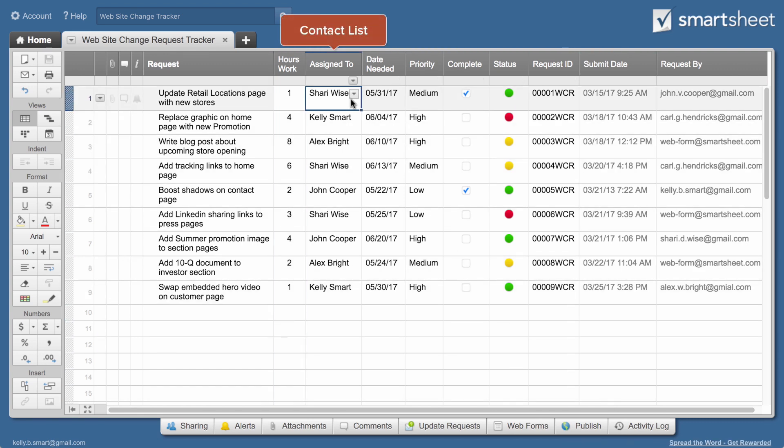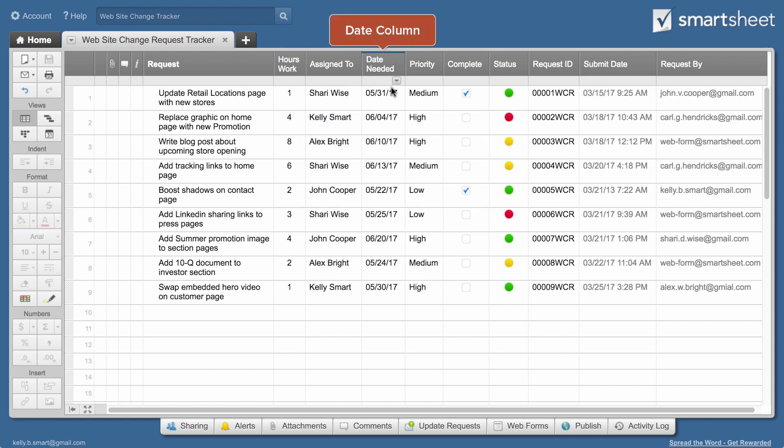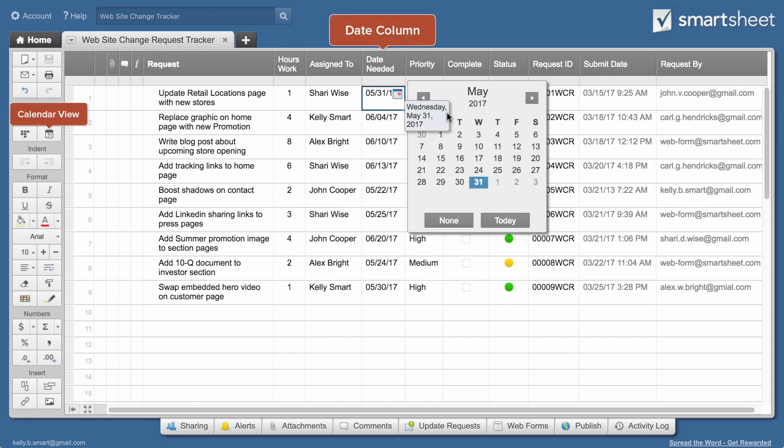Contact list columns make it easy to assign rows to contacts from your Smartsheet contact list. Columns with date properties enable you to view dates on a calendar. Use columns with start and end dates to view your work as a Gantt chart.